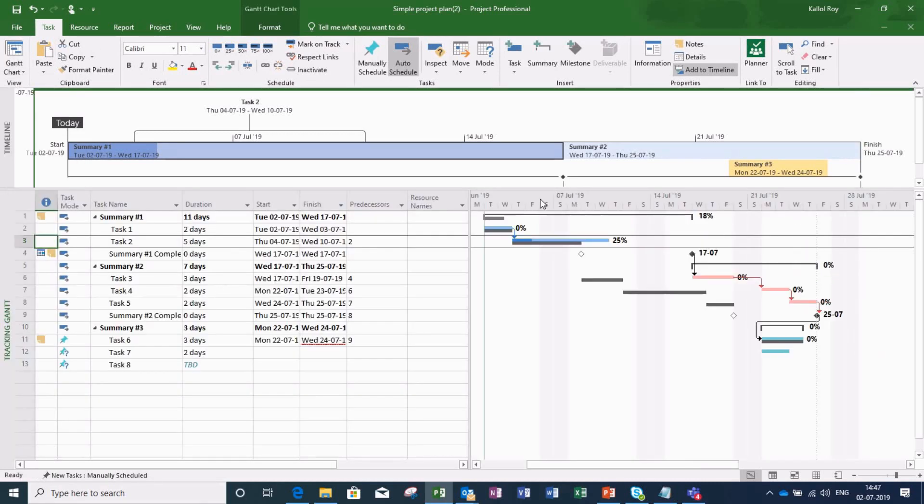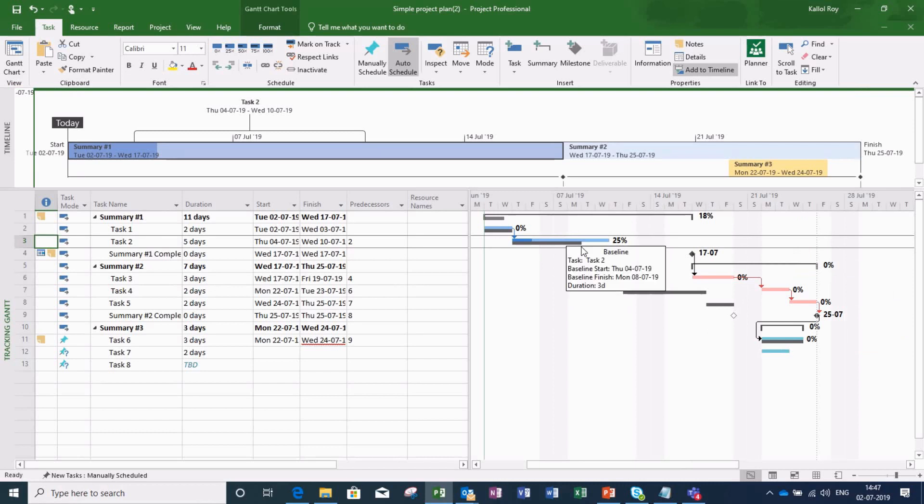So here you can see my changed plan and compare the deviation from the original plan.